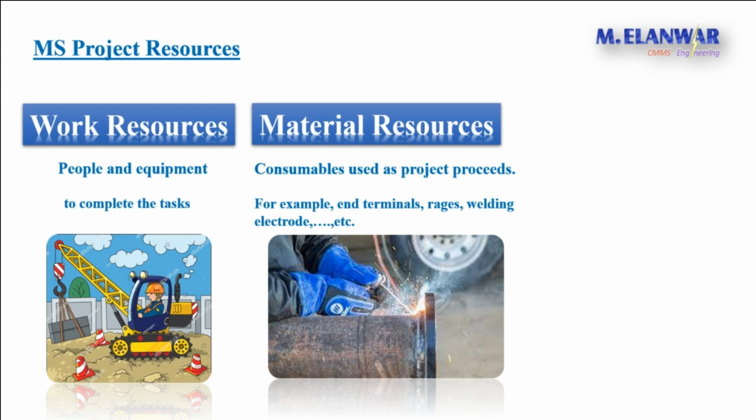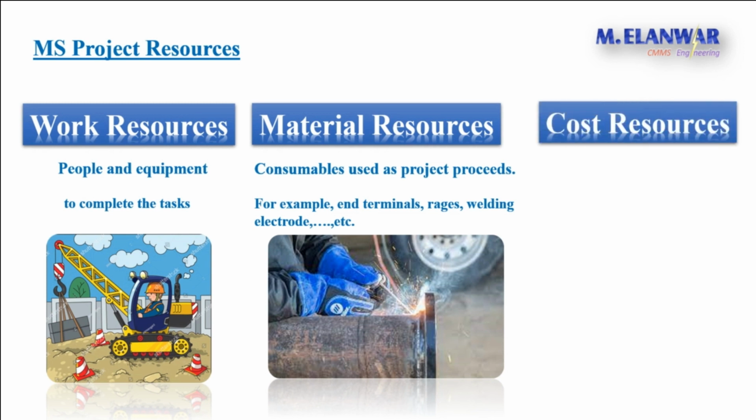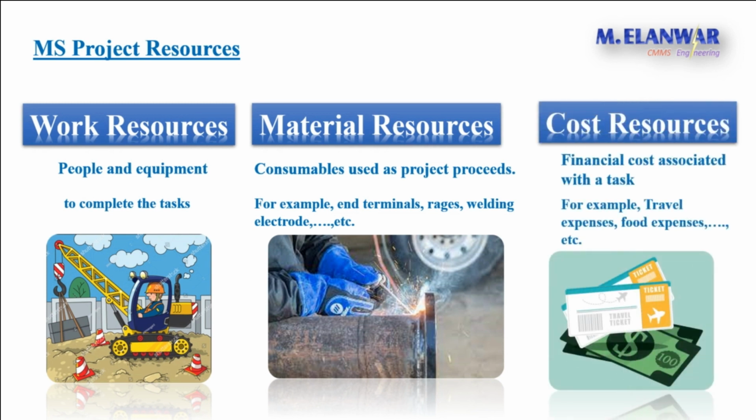The last type of resource is a cost resource. These resources have a financial impact, not dependent on time or duration, and we can consider it a flat rate cost. For example, travel expense, food expense.